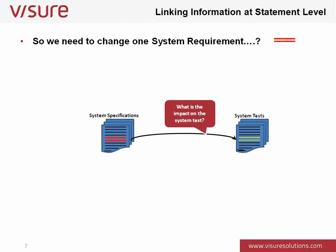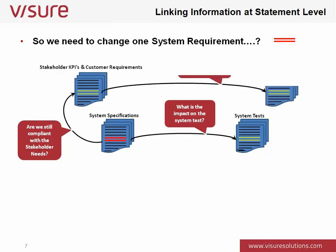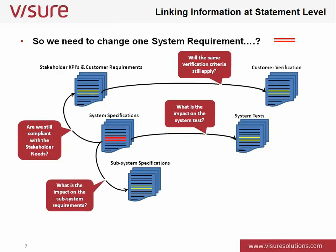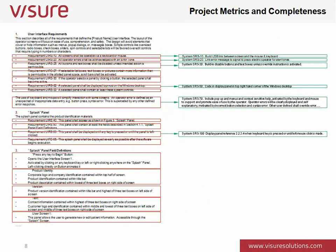It's this same traceability we use to produce our project specifications and project metrics information. If a system specification requirement changes, we ask: are we still compliant with what the stakeholder originally asked for? We have an explicit link from the system specification to the KPI requirement or stakeholder requirement that was driving the system requirement in the first place. If the subsystem specification is impacted, it could also have an impact on subsystem tests. Understanding the impact of that change — what is touched — allows us to make more informed decisions.